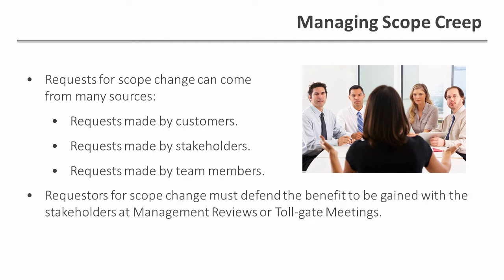When someone does identify a need for scope change, they should be able to explain the benefit of the scope change to the project stakeholders. If the benefit is attractive enough, the project scope should be changed. But that is a formal change to the project charter and deliverables that requires a new project baseline plan, and it is not scope creep.